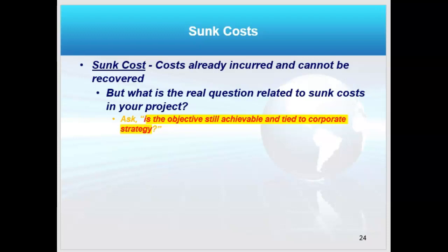So when the question comes up about sunk costs as a project manager, always ask yourself this question. What is the real question related here? And the real question is this. Is the objective still achievable and tied to corporate strategy? If the answer is yes, then sunk costs don't matter.